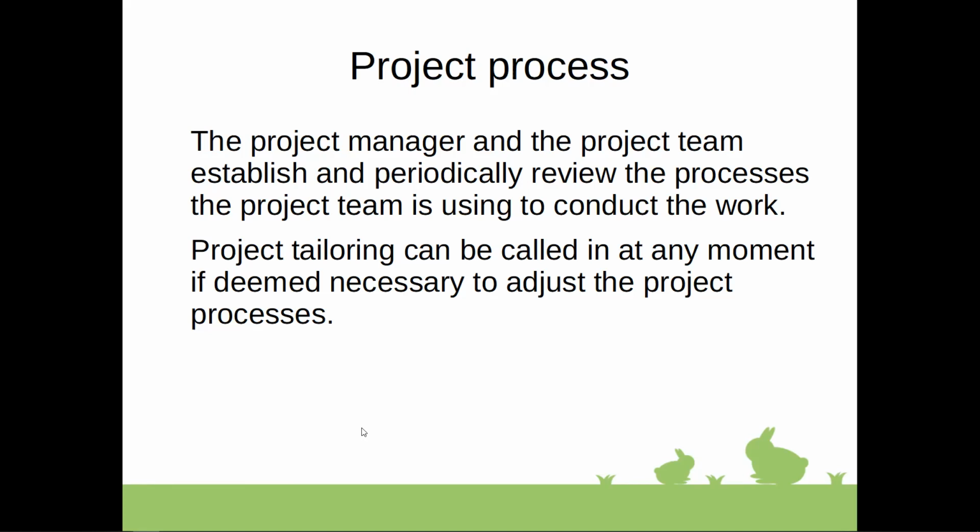There are several methods to optimize the processes. One is called lean production methods, and that's essentially, as I mentioned, around lean methodology. It's a technique that maps the value stream to measure the ratio of value-added activities and non-value-added activities, and to eliminate anything unnecessary in the flow.